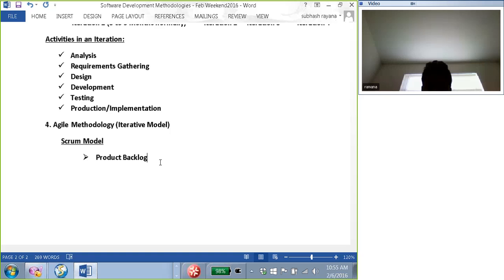As a business analyst, you will probably be responsible for interacting with the users and documenting this product backlog. Let us say we want to implement some 50 features of the website, F1 through F50. These are the features that we have identified as part of the product backlog.